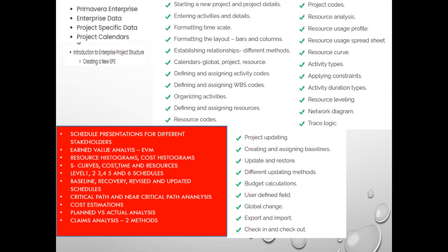Let's say after estimating, you find that this project needs 1.5 billion, and the project duration is 24 months. This 1.5 billion will be distributed based upon the planned start and finish of the activities. The software generates it automatically. At the end, if you add the cost of the 1st month, 2nd month, 3rd month cumulatively, the S-curve being a cumulative value over time, the total will be 1.5 billion. So it will automatically distribute. Clear?